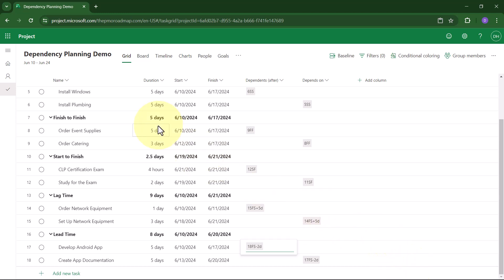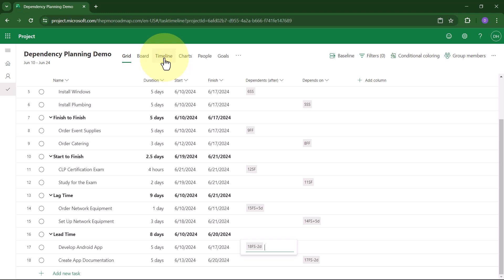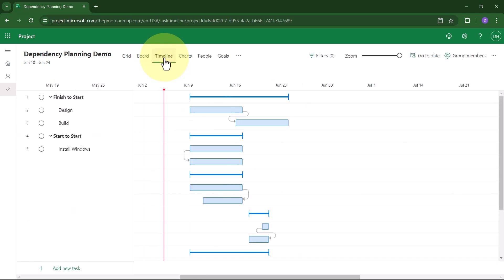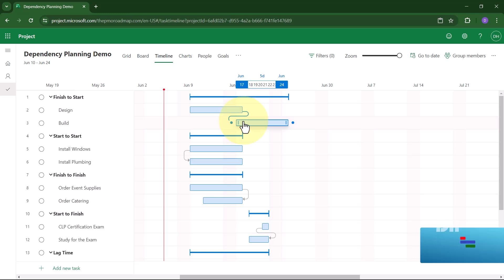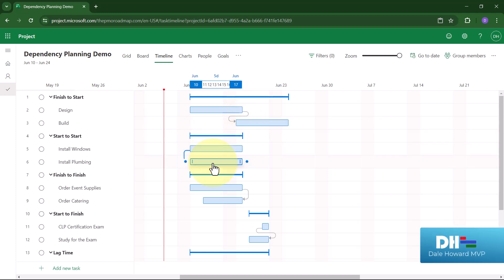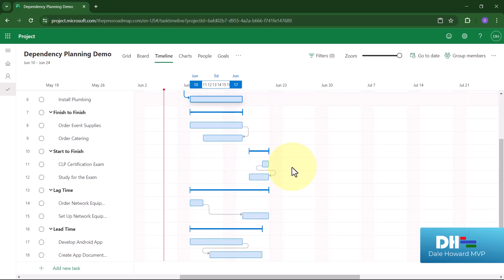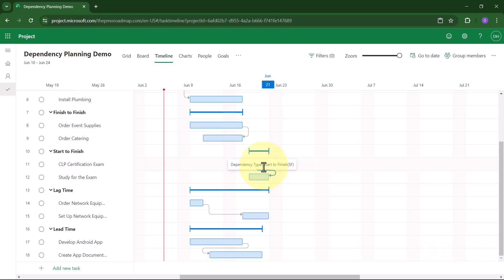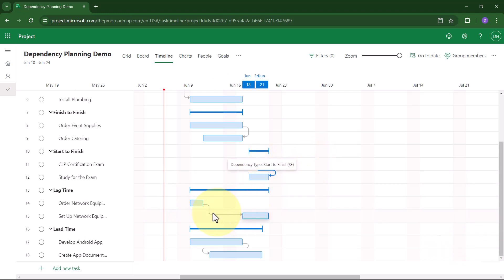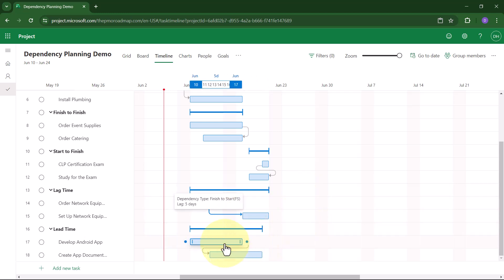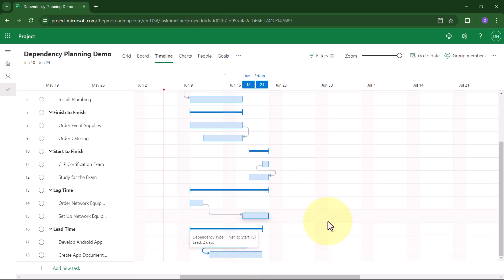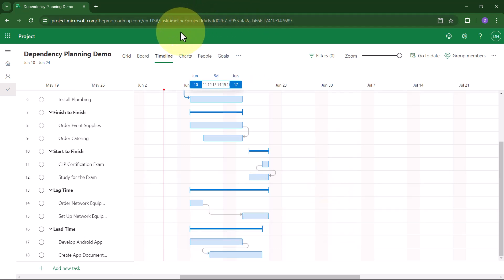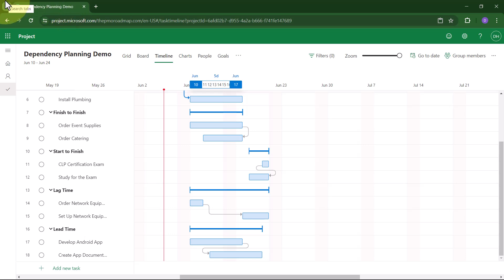Now let's go see what they look like in the Timeline view. In the Timeline view, Finish-to-Start. Yep. Start-to-Start. You bet. Finish-to-Finish. Yep. That's what I expected. Start-to-Finish. There's that weird backwards dependency. Here we go. Finish-to-Start with Lag Time. Finish-to-Start with Lead Time. See how they overlap. So that's how to use all of these new dependency types in Project for the Web.